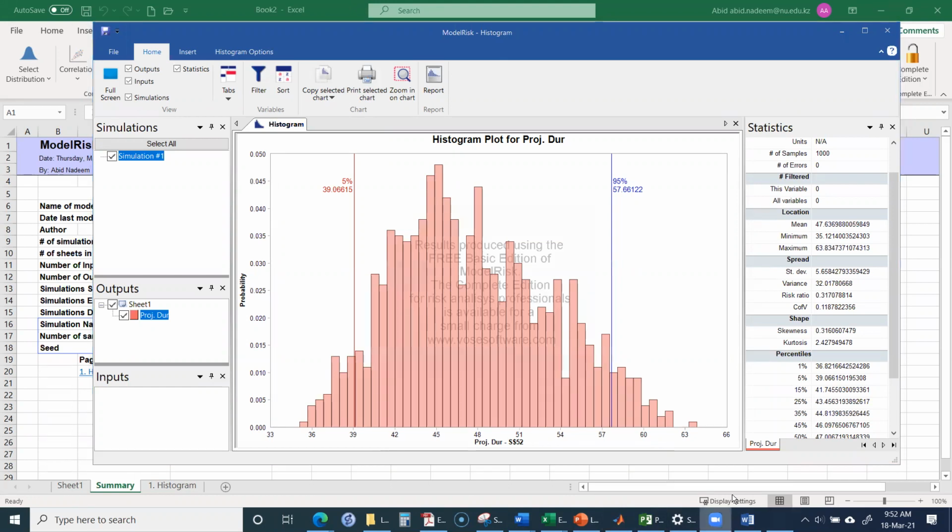No, actually, what I wanted to say is that I forgot to tell about that. There is actually a bias in the triangular distribution, and that bias is necessary. In the project situation, there is more chance that the activity duration will be more than what you expect.